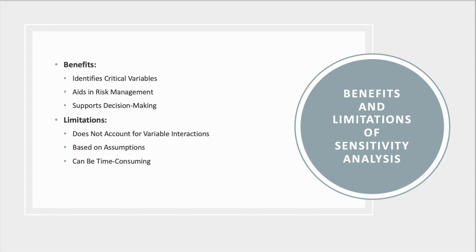Let's discuss the benefits and limitations of sensitivity analysis. On the benefit side, it helps us identify which variables are critical to the success of a project. This, in turn, aids in risk management and supports more informed decision making. However, sensitivity analysis isn't without its limitations. For one, it doesn't account for interactions between variables. It's also heavily based on assumptions, which might not always hold true in the real world. Finally, conducting a thorough sensitivity analysis can be time consuming, especially for complex projects.